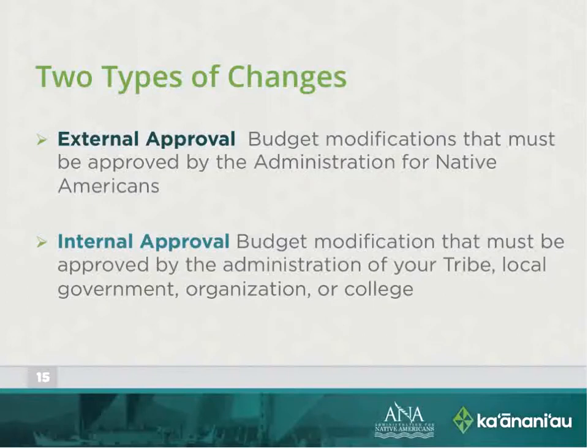So the grantee went back and they devised an allocation based on the percent of time each program used the conference room. And then they charged each program proportionately. And so the initial charge to ACF was $55,000, but after they reallocated the modification to other programs, the cost to ACF's grant was only $20,000. So therefore we were able to take the other $35,000 and reinvest it back into the project.